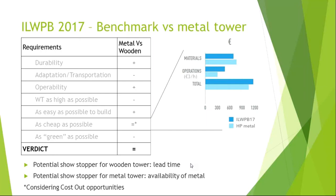So the data that I have show a bit lower prices also for the metal towers. Yeah. But I guess it depends also on the country where you buy the materials. Definitely. Yes. I guess you're not so far from my results, because I had 600 euros for a metal tower that supports a 4.2 meter turbine. Yeah. So I think when we sell a metal tower for a 2.4 meter machine, we sell a tower for around 1,000 euros for a 12 meter tower.